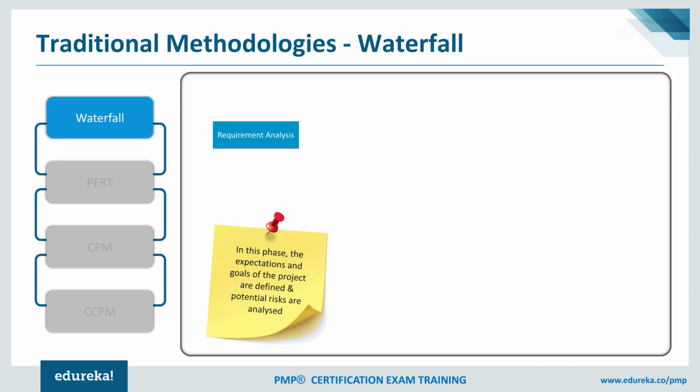As you know, the Waterfall methodology was typically a phased approach. Starting with requirements, that's where we used to gather all the requirements upfront for the project. Whichever project you were working on, we used to spend a good amount of time gathering requirements and we used to freeze the scope. There used to be a sign-off process, and once the scope is frozen, obviously we can't really accept any more changes.